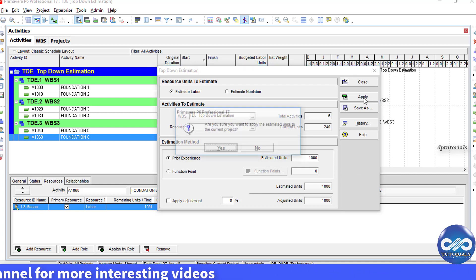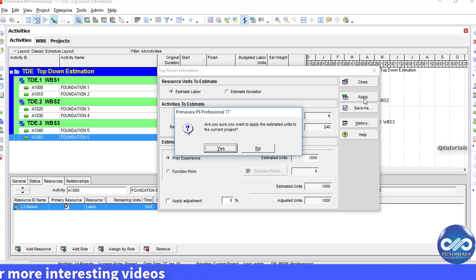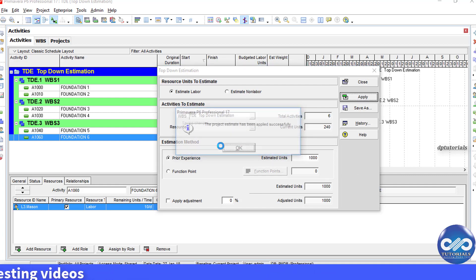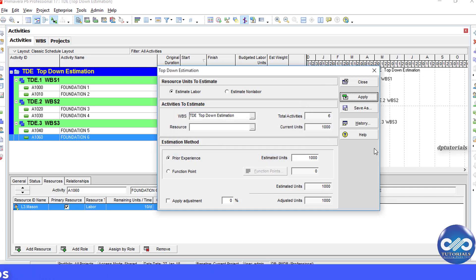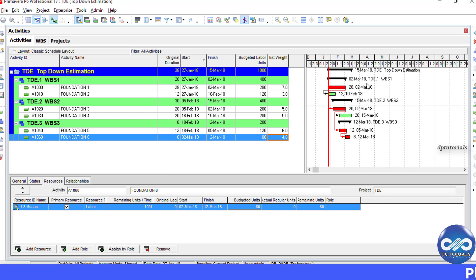So, when you click this Apply button, you can see the WPS and Activities will have this 1000 units distributed by the weightages that we have given.